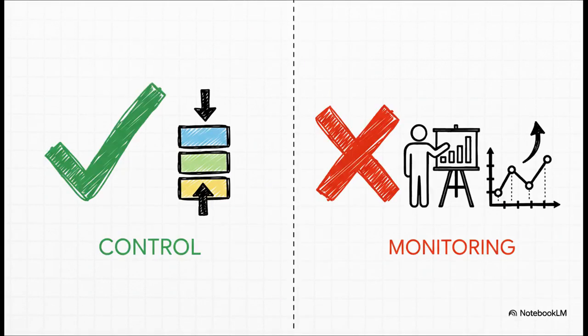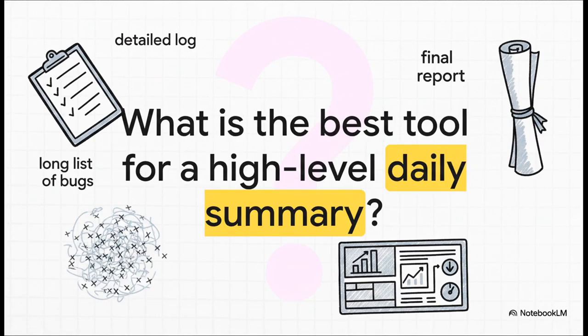And the correct answer is C, reprioritizing the tests. Why? Because it's a direct corrective action. Reporting the delay or updating a chart, those are monitoring activities. They're about communicating information, not doing something about it. That's the key difference.